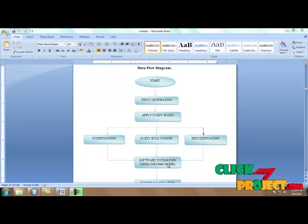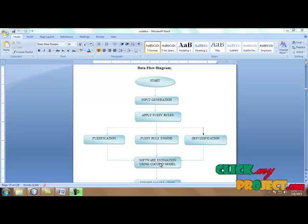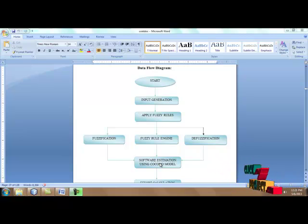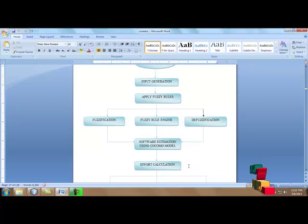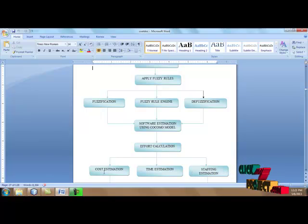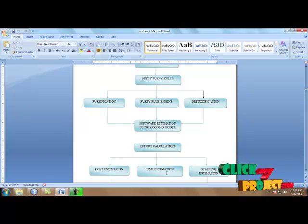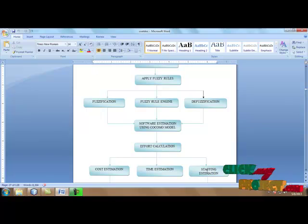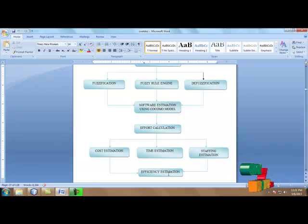Then it moves to software estimation using the COCOMO 2 model. Using fuzzy-based rules we can easily identify the cost estimation, and the cost is lower compared to the original COCOMO 2 process. Software estimation is based on three calculations: effort calculation (based on cost and time), cost estimation (how much cost is taken), and staffing estimation (how many months and schedules are needed to complete the process). The overall estimation produces better results, and the efficiency of our fuzzy-based COCOMO 2 is evaluated and compared to the original COCOMO 2.